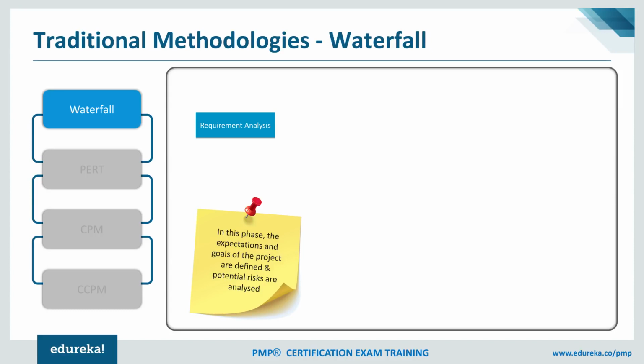As you know, the waterfall methodology was typically a phased approach. Starting with requirements, that's where we used to gather all the requirements upfront for the project. Whichever project you were working on, we used to spend a good amount of time gathering requirements, and we used to freeze the scope. So there used to be a sign-off process. And once the scope is frozen, obviously we can't really accept any more changes.